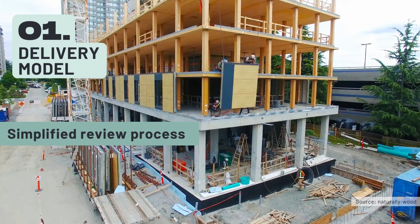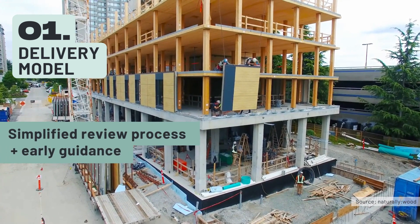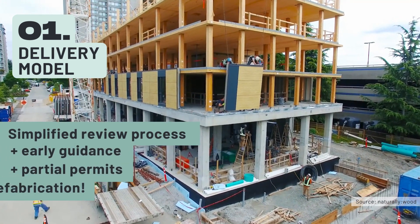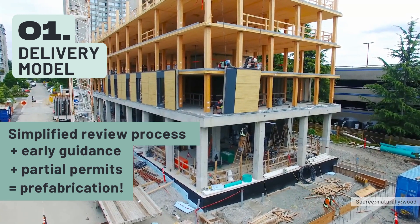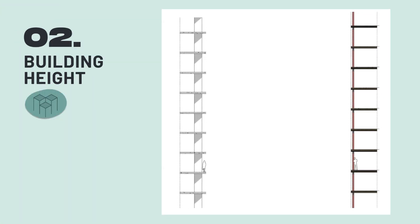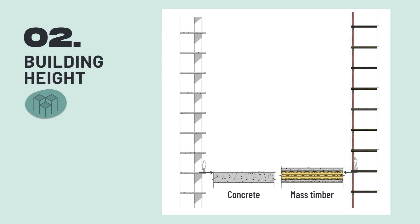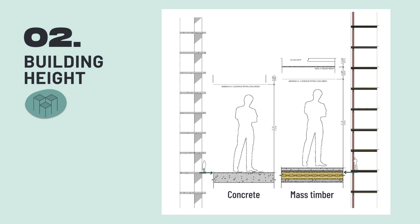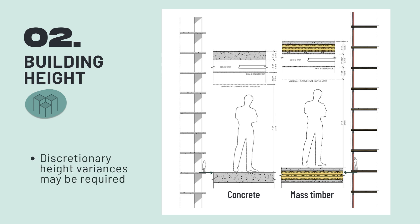Simplifying the review process and providing early guidance and partial permits will allow prefabrication to begin early. Mass timber buildings may not fit under the same height restrictions as a concrete building because mass timber floors are thicker than concrete floors, which translates to comparatively taller buildings to achieve the same interior clearances. To accommodate this, discretionary height variances may be required.